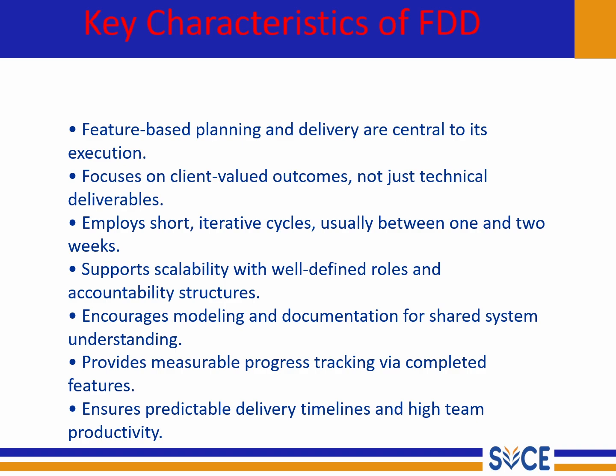So the goal is not merely to write code or complete a task, it's to create something the client can see, use and appreciate. Next, FDD works in short iterative cycles, typically lasting 1 or 2 weeks. This allows for frequent feedback, regular progress checks and early identification of issues, which makes the process dynamic and responsive.